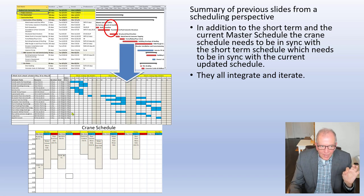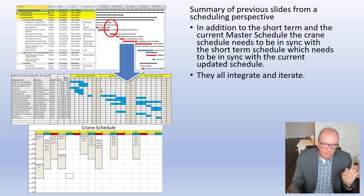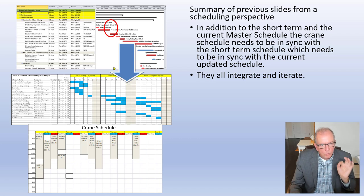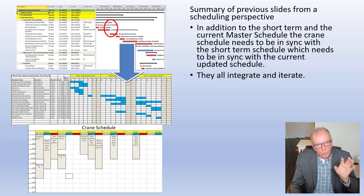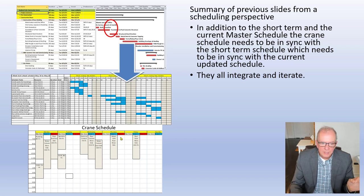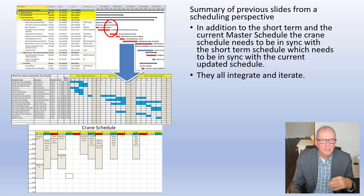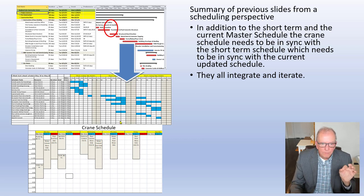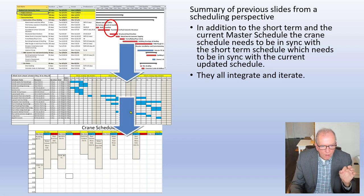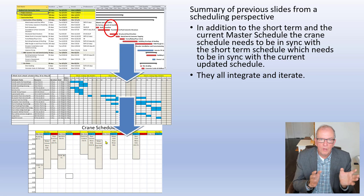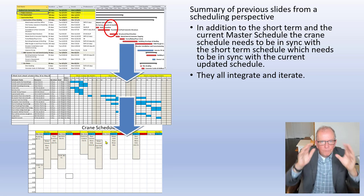The master schedule is filtered, then this is more detailed out with the inputs and agreement of the trades. We're trying to achieve a much more even flow, a pull system if we're getting into lean terminology. But even if not, we really want to have a nice even flow. We want to have trades that buy into the schedule because they were part of the development. This is also going to help us for things like on-site detailed schedules, material hoist, crane schedule, certain key pieces of equipment. We can develop those components off of this and make sure that everything is being optimized for the overall project, not just for individual trade, not just for the GC, but for the overall project.